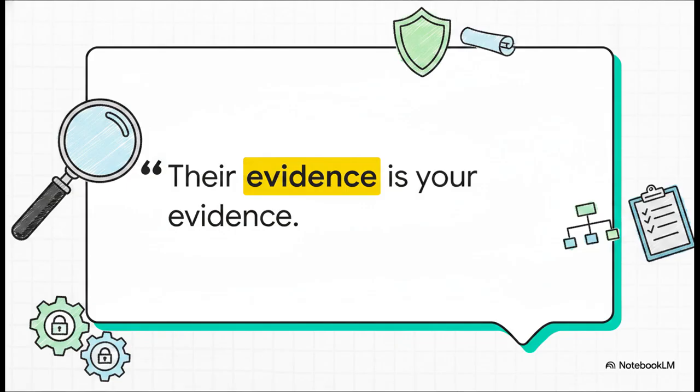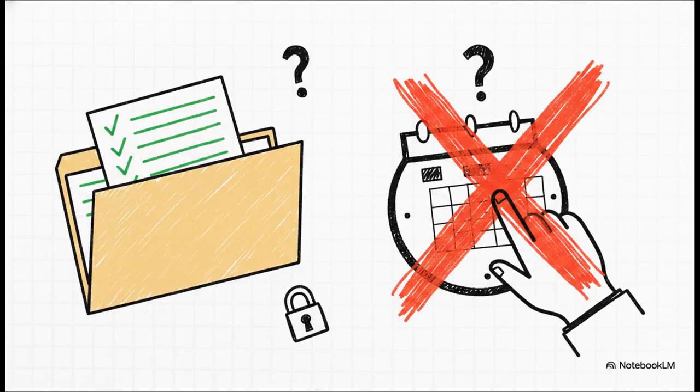Now, if you use an outsourced testing supplier, you need to pay very close attention to this. Their evidence is your evidence. Feeling like your external QA vendor is part of the team changes absolutely nothing from a regulatory standpoint. Even if they sit in your daily stand-ups and use your Jira board, you must still tightly control and verify their output. You are the manufacturer. You hold the ultimate regulatory obligation. No exceptions.